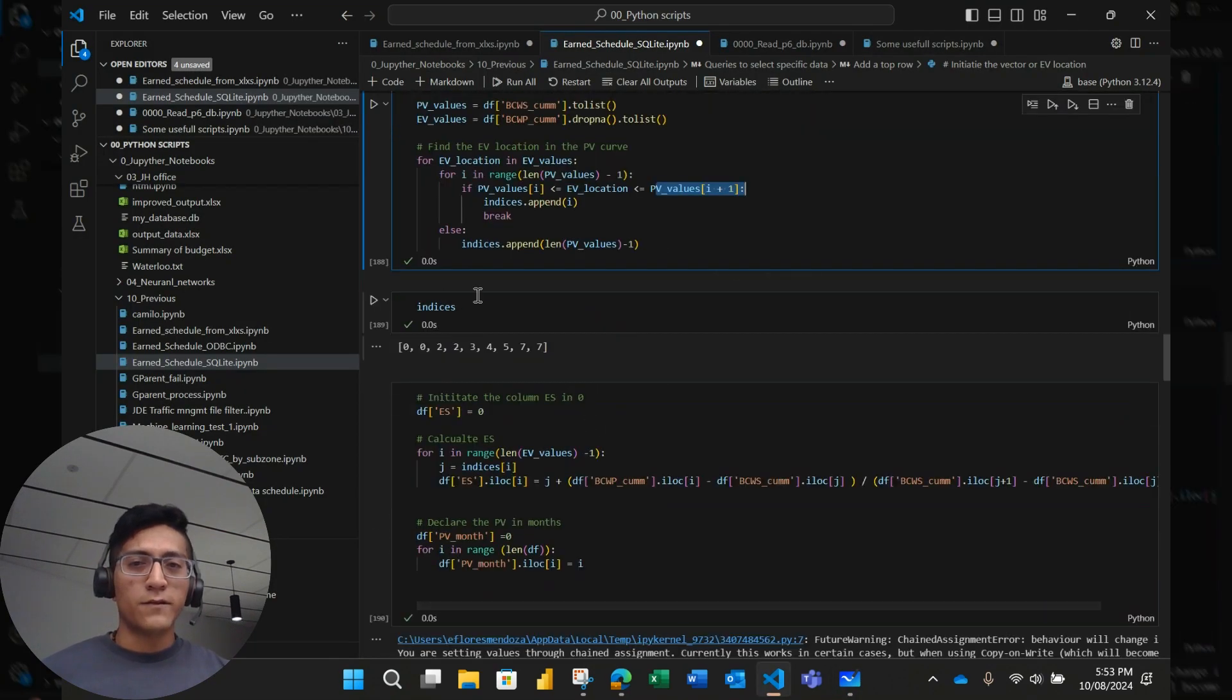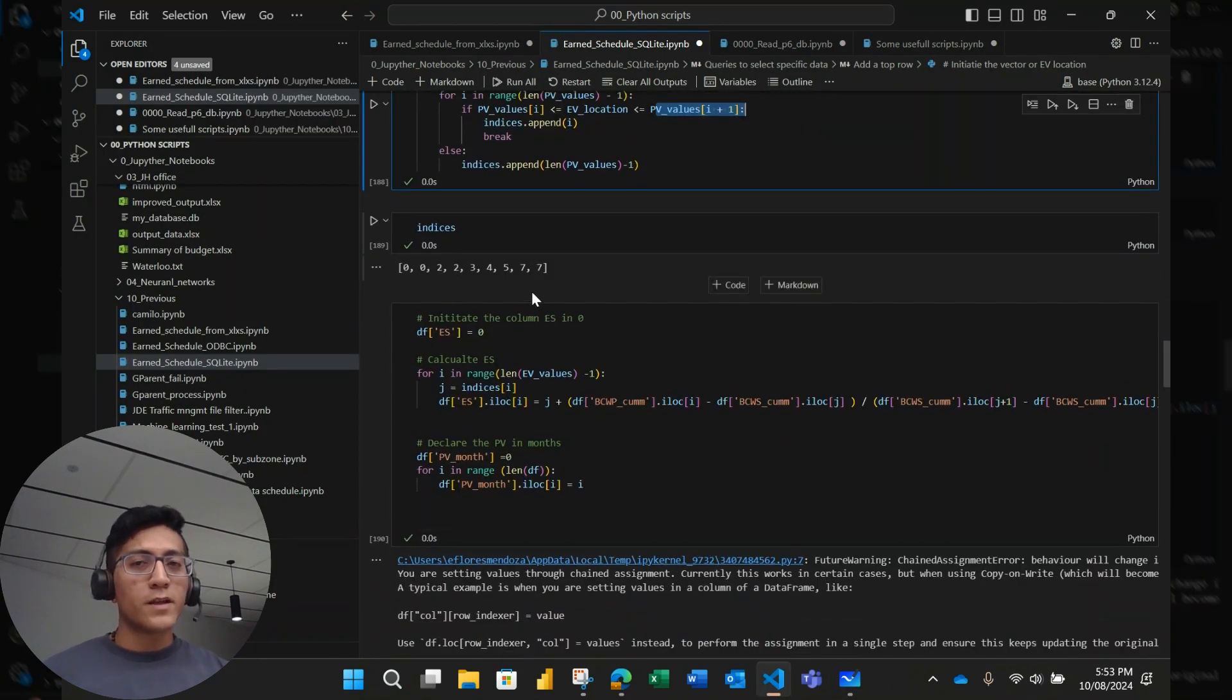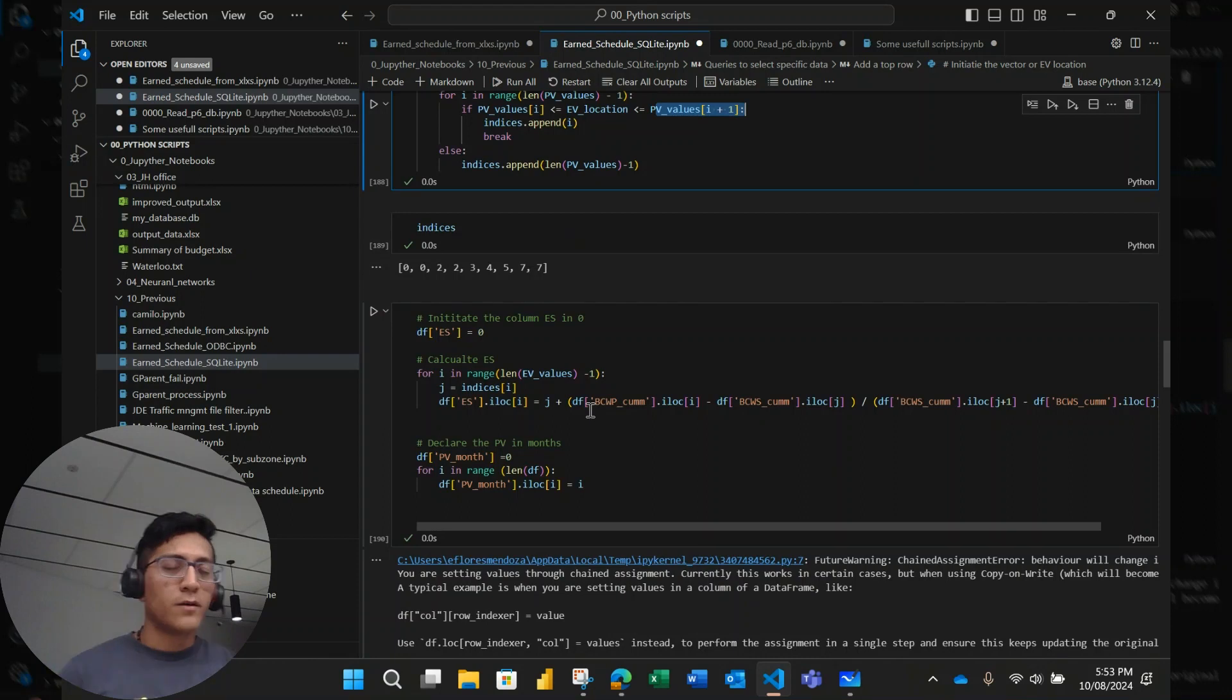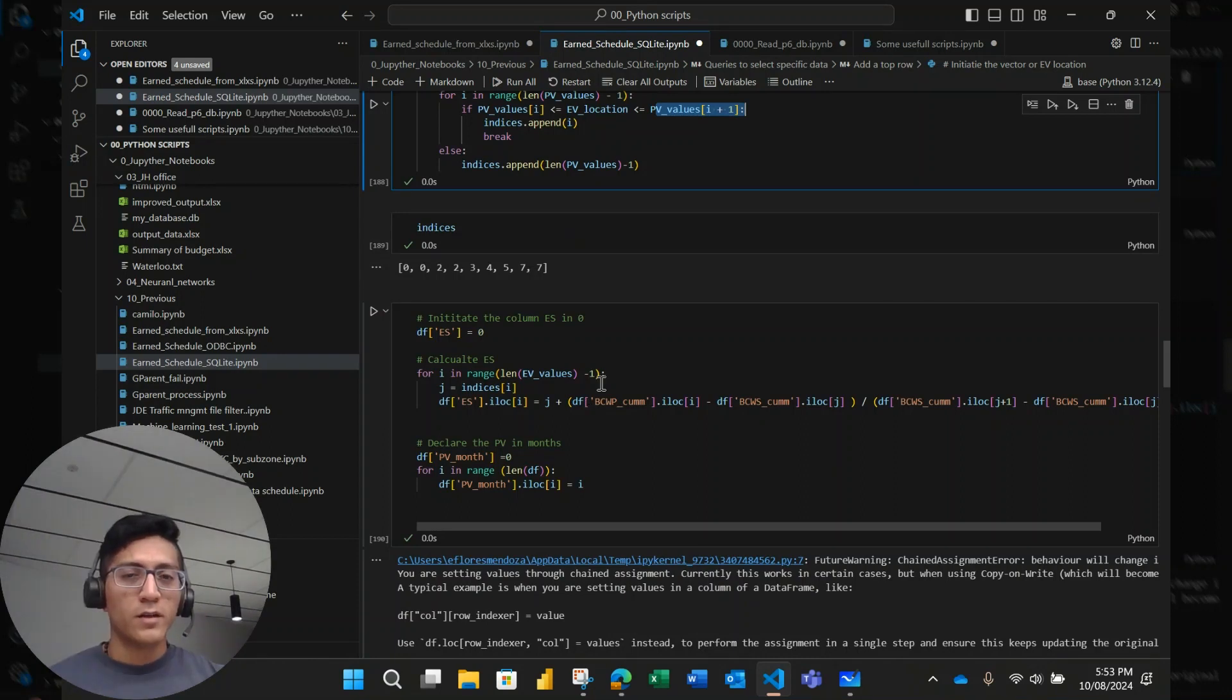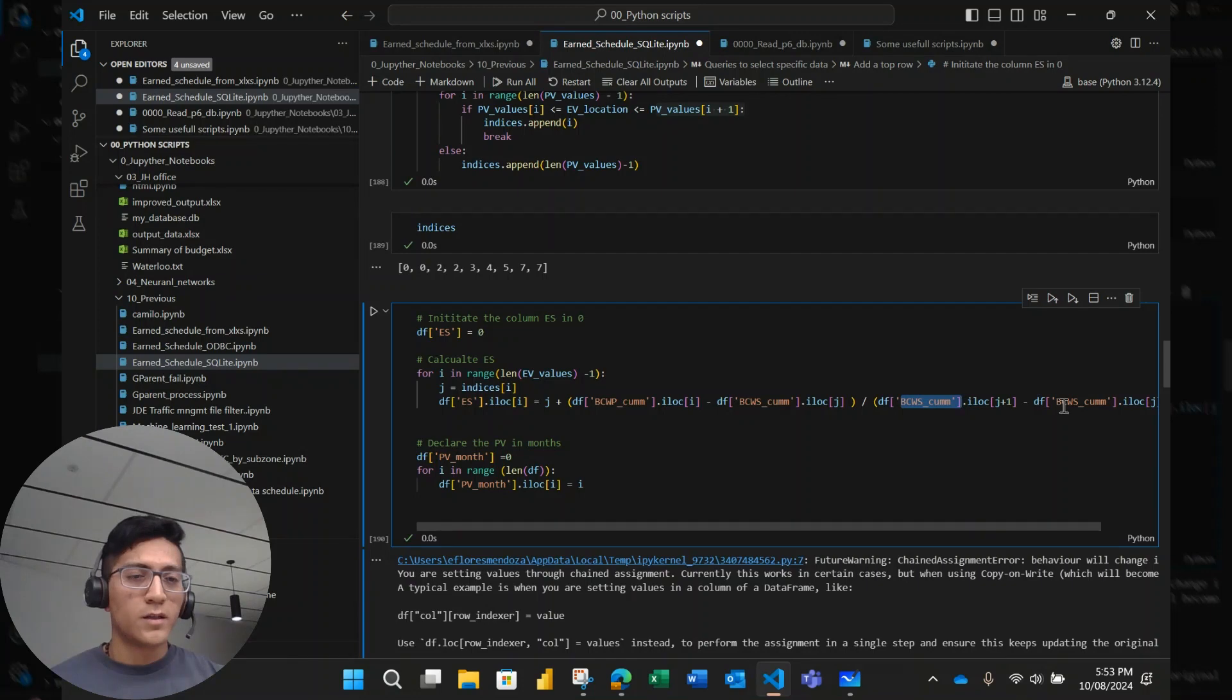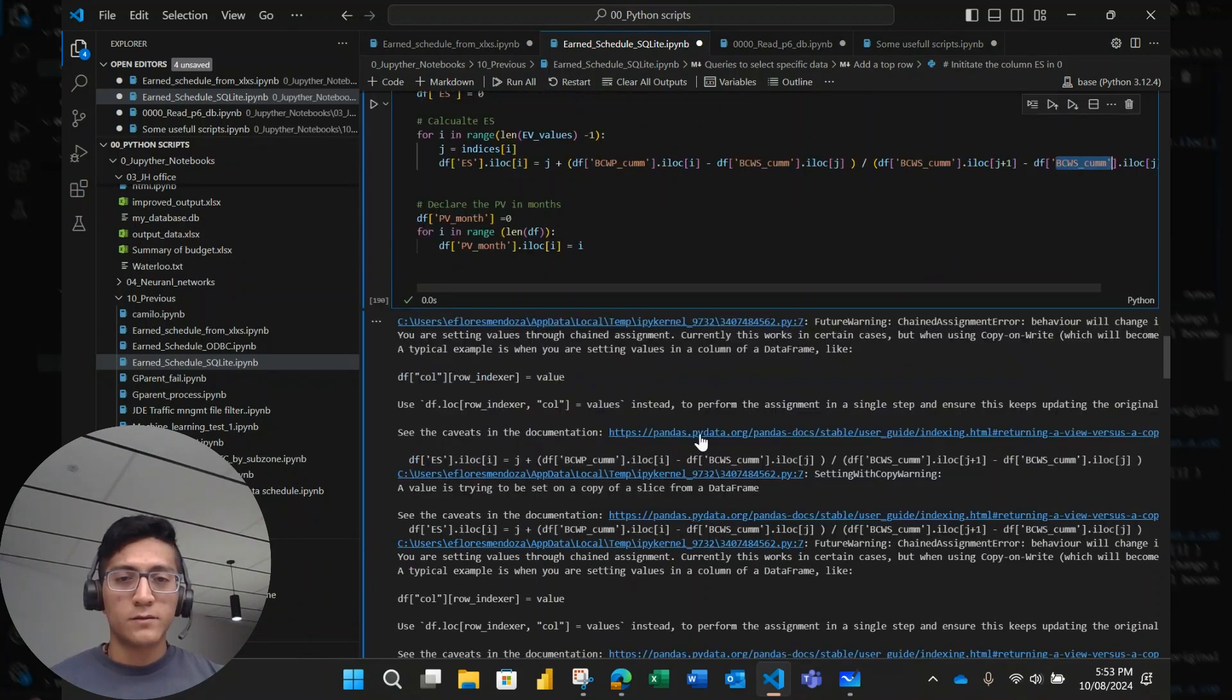I have the indices. And then once I got the indices, I can run the formula in an automated way without needing a manual process. This is the automated process, the earned schedule. It's for each earned value and the lower planned value, the upper planned value and the lower planned value.